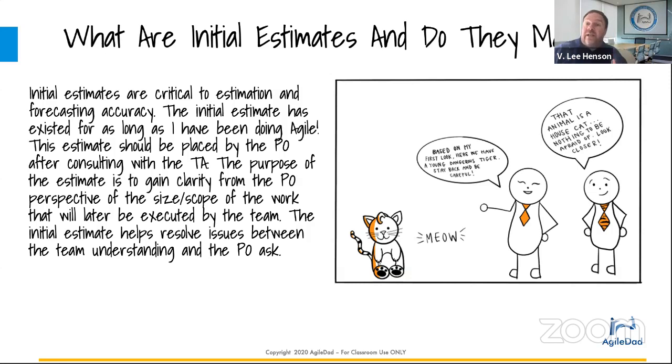One key there is you want to keep the team consistent to keep the team's velocity consistent. So if you find you're in a position where you're constantly rotating team members in and out, you may not have an opportunity to get consistent velocity. You need to keep those teams consistent and let them swarm to work, as opposed to constantly pushing people on or off teams and trying to figure that out.